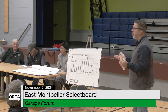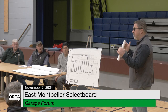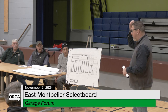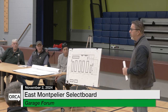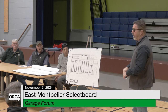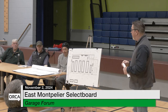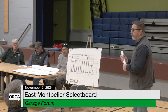So a lot of those things we'll determine, and as we determine them, we'll either use that contingency to address those issues, or we'll reduce the contingency, hopefully both, and eventually come to the end where we'll have a final number. When I say the end, that's when we bid the project out, likely in February or March of next year. We'll have a really good number to work with. That is, again, hopefully much less than what we have planned for right now.